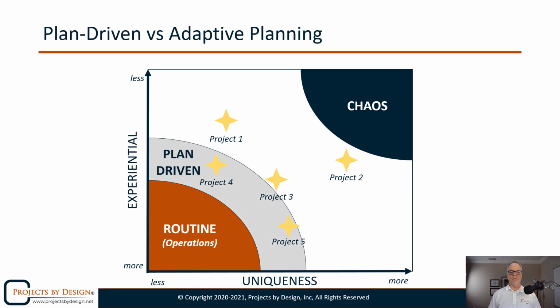If your project tends more towards routine, you have more experience, and it's not nearly as unique, but you decide to projectize, a plan-driven approach is oftentimes appropriate to deliver that project because you can drive your plan with a lot of certainty. Plan-driven works because we can answer the questions or uncertainties so that we lower our risk and say, let's just follow these steps and we'll be good to go.